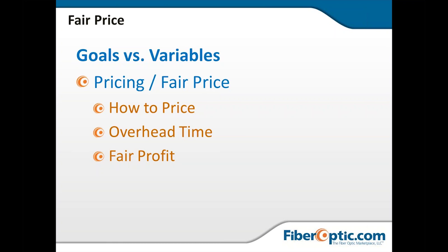And then they add a multiplier for overhead, a multiplier for profit, and a multiplier for travel and other back office costs. So they want to know all the way down to the bottom level, are you putting good people in the field that can stay and finish the project? That seems to be a trend, which is surprising to many companies, but is continuing.